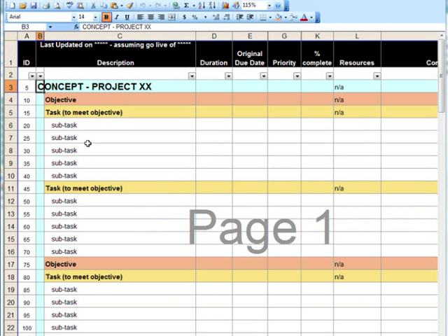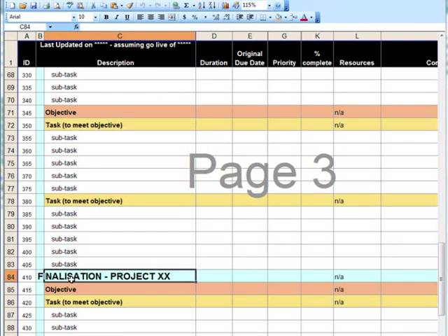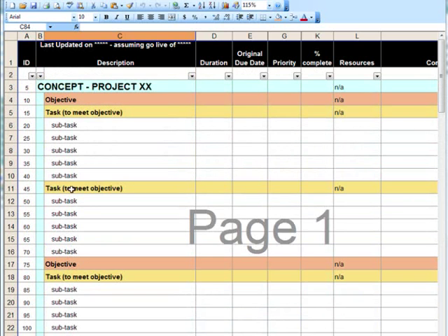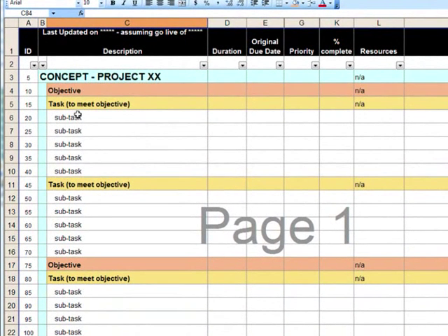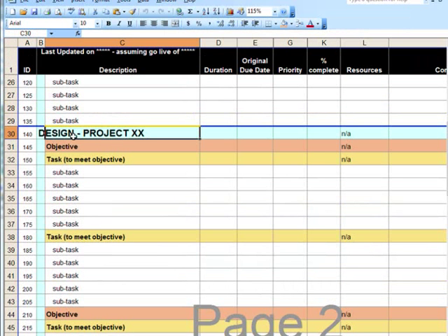As with all standards, the tasks are broken down into the order or process of the project, including concept, design, implementation and finalisation. The concept stage being all the tasks that must be undertaken to clear the go-ahead for the project, including approval by board or senior management, business plans that validate that the project was worthy of going ahead. Similarly with financial plans, all the tasks that must be undertaken which clarify the approval of the concept of the project. The second stage is design, which is all about the planning stage of the project, getting everything ready in order for the project to go ahead.